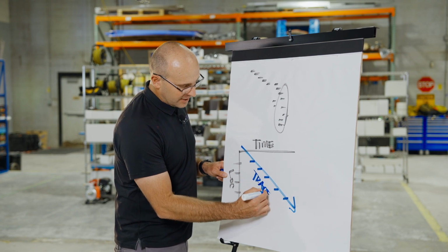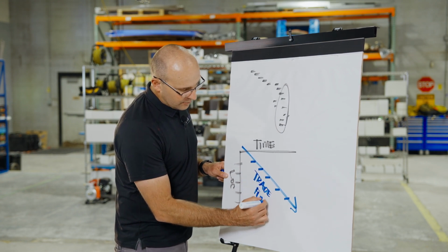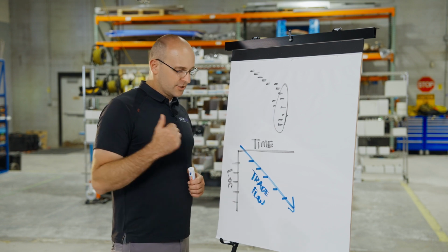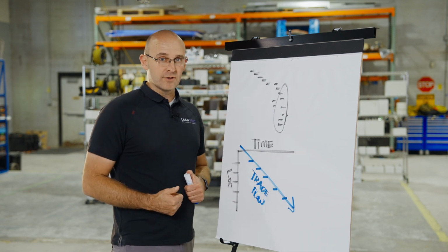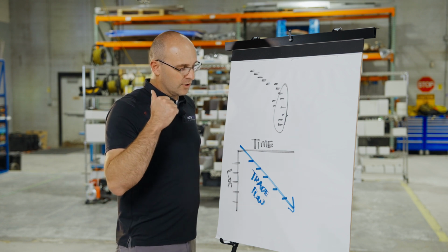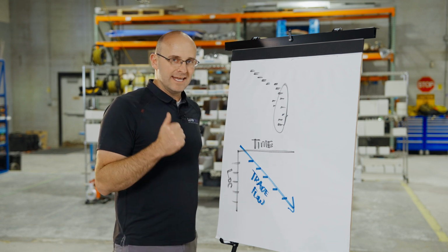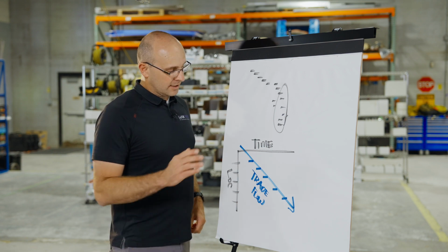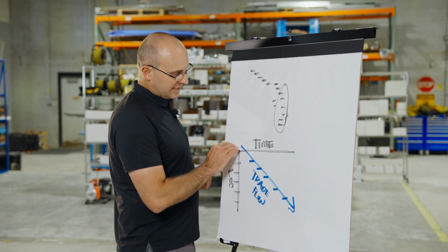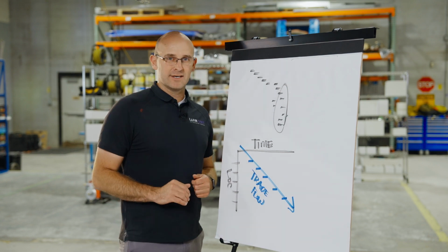When you have trade flow, and you have the right number of zones, and your zones are leveled, and your crews are leveled going through those zones, you will go faster than any other possible method or scenario in construction. And so takt planning is all about protecting this line of balance.